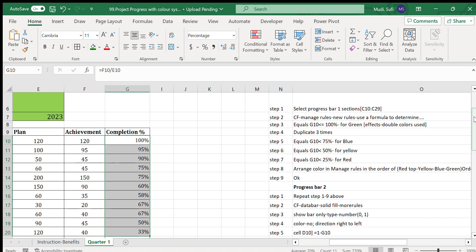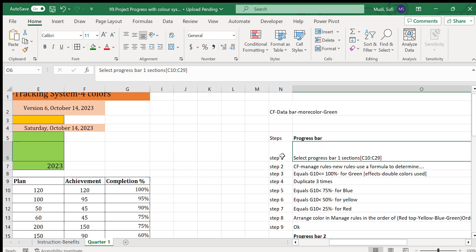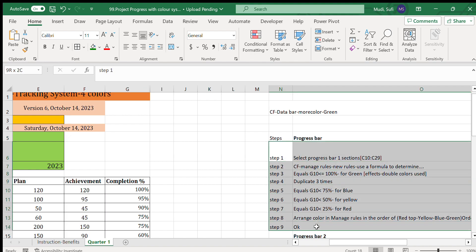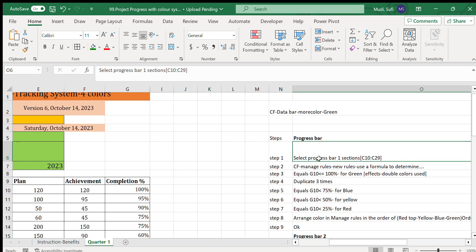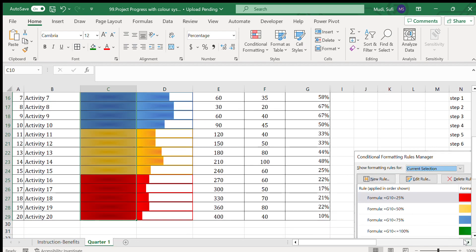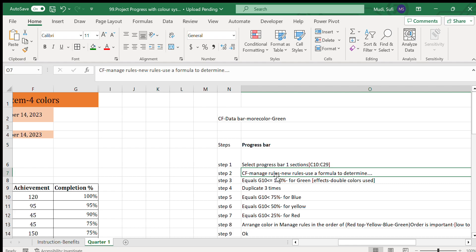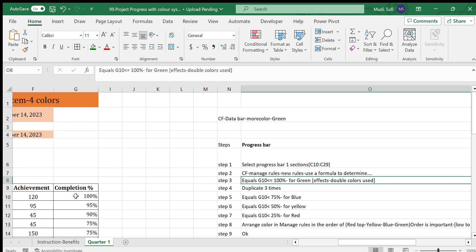To construct this, we used conditional formatting under the Home tab. For the first bar section, we use nine steps. The first step is selecting the progress bar section area — we highlight this section — then go to Conditional Formatting, Manage Rules, New Rules, and use a formula to determine. With an equal sign, G10 should be less than or equal to 100%.